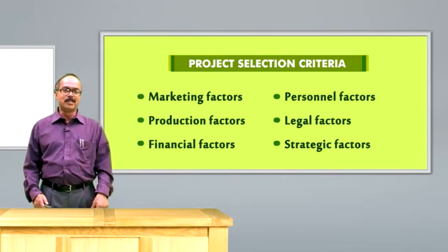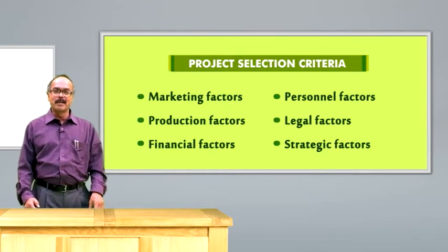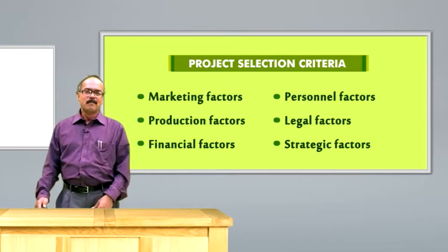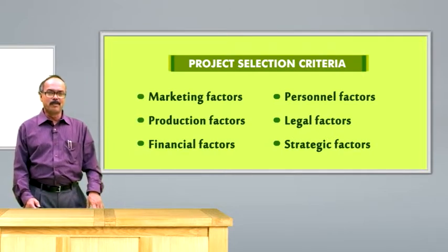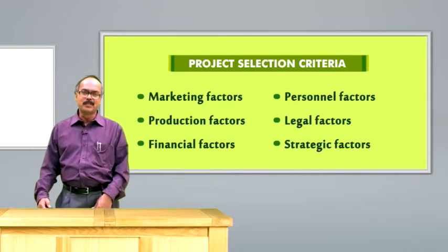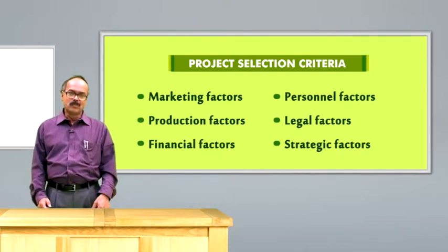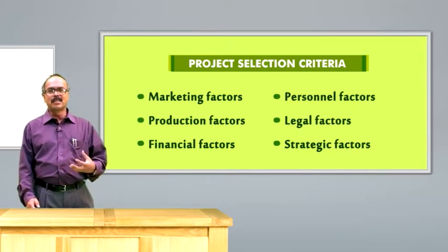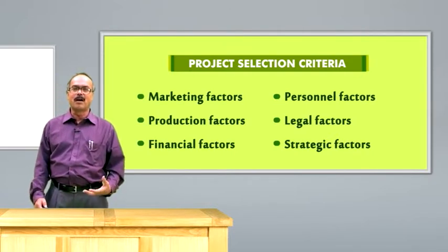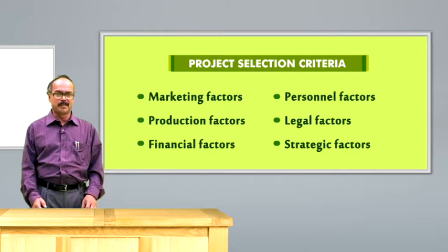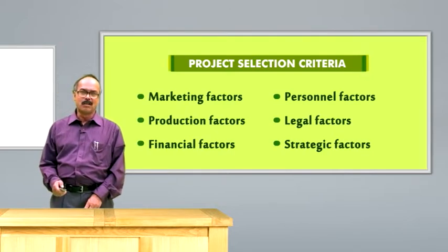Cost of the project and means of sources, impact on the current financial position of the firm, profitability in terms of profit margins and returns on investment, payback period, time period to reach the break-even point, and working capital needs. The higher the time required to reach the break-even point, the lesser the prospect for higher and dedicated return. Working capital needs were already told.